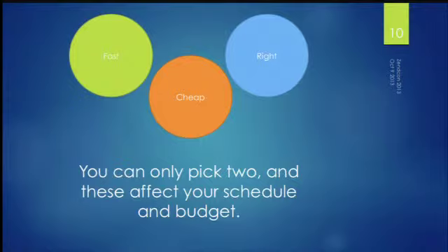And of course, there's the old adage that you can build software 3 ways: fast, right, and cheap, but you can only pick 2. Having specifications will allow you to build a schedule and charges and allow you to stick to 2 of these 3 rules. So if you know it's going to take you 6 months, but the client wants it done faster, you know that it's going to cost more.